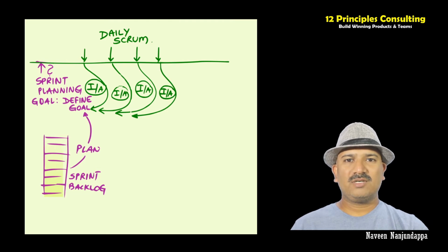Daily scrum is a maximum of 15 minutes discussion between the developers for adapting their plan, done at the same time, same place, every day, in order to reduce the complexity. This eliminates all other meetings so that the teams are effectively focused on the goal.